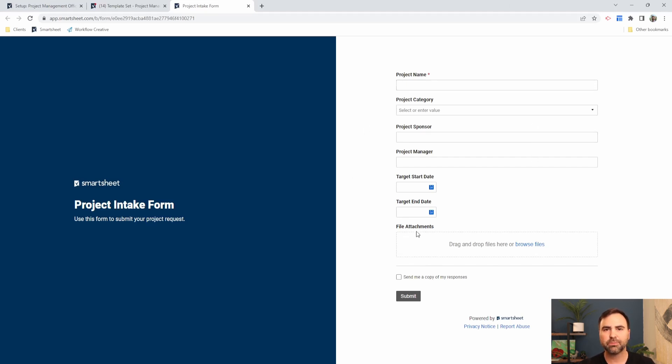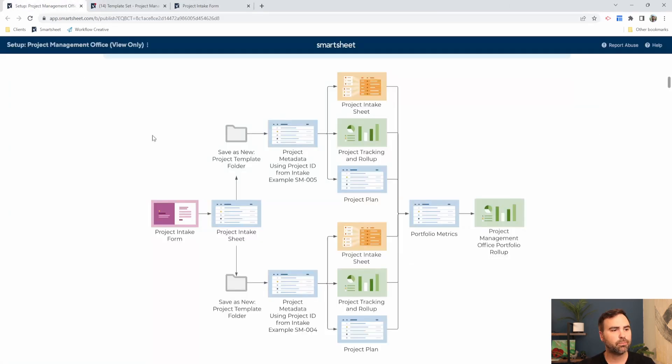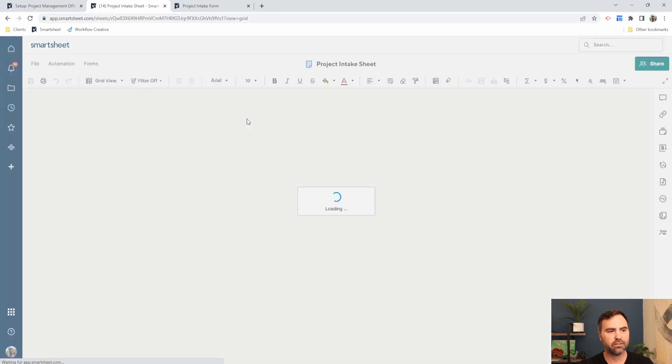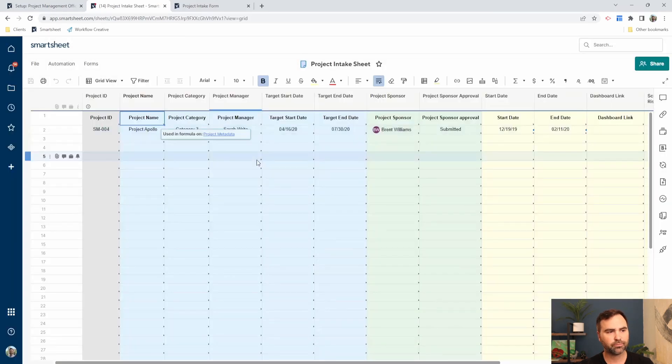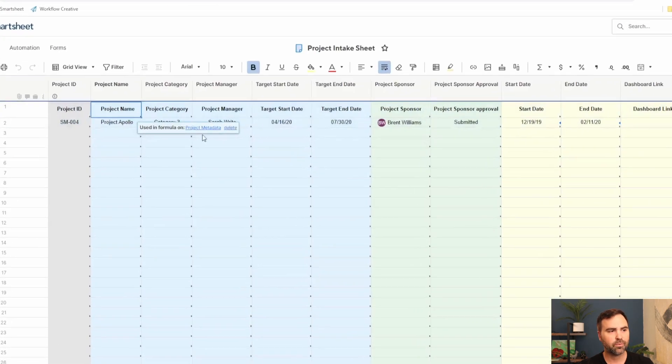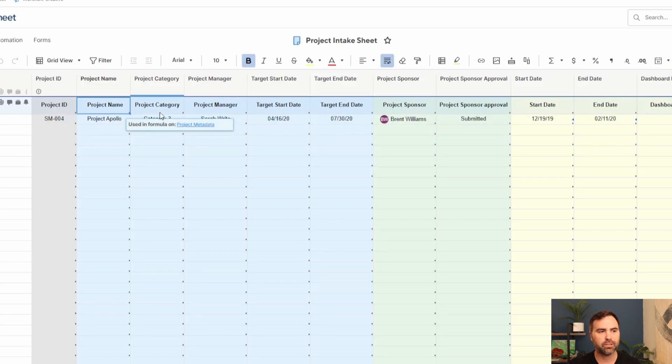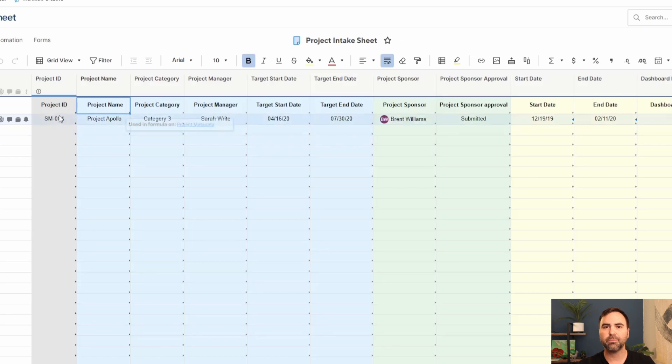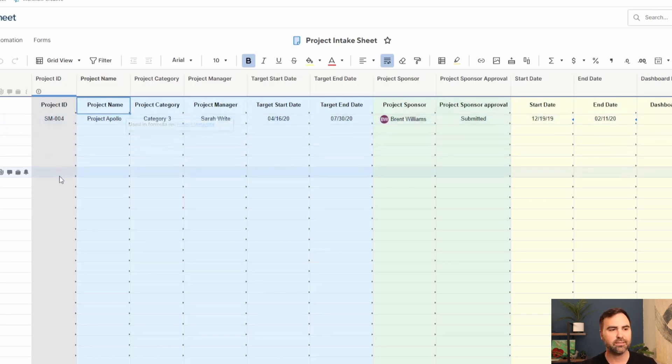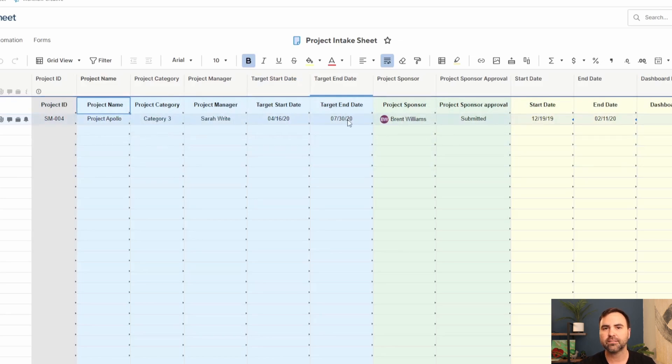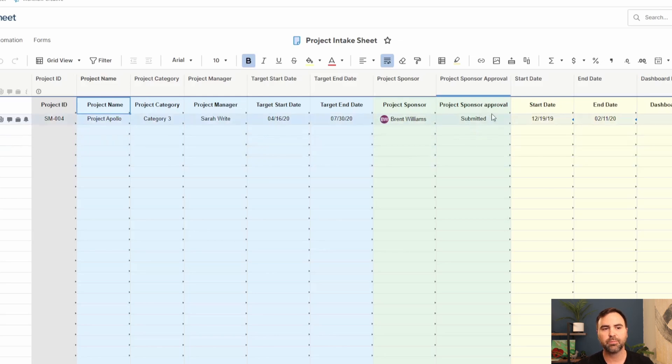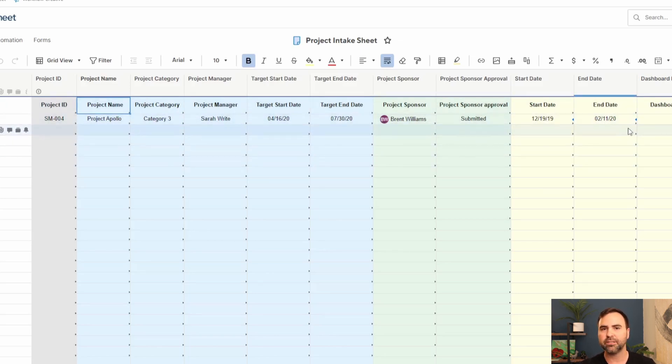Once a user submits this form, the form ends up in our project intake sheet. All that data exists in a row in our project intake sheet. We have things submitted in the form like our project name, project category, the project manager. It also assigns us with a project ID. This is an automatic field that you can configure to assign your project IDs. Our target start date and target end dates which were submitted by the end user, the project sponsor and then that sponsor's approval as well as some additional information.